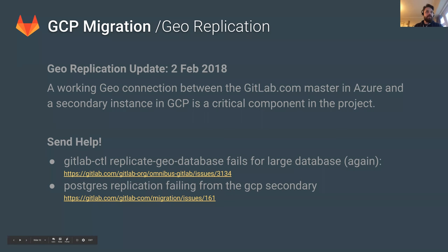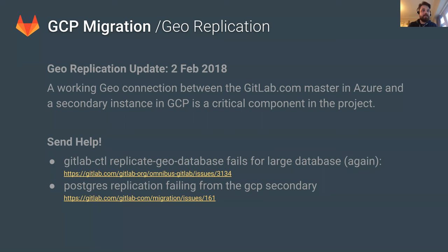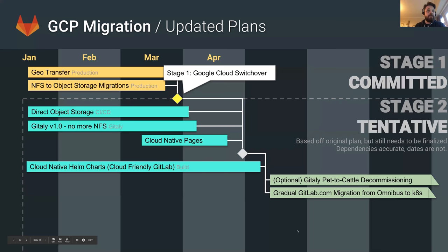Probably the most important part of the first stage of the GCP migration is the geo-replication. John Jarvis and the production team are working to get this started as soon as possible. Right now we're experiencing some problems with replication on Postgres, and I've linked to two issues — anyone who can help out would be greatly appreciated. We hope to have the Postgres replication started in the next few days.